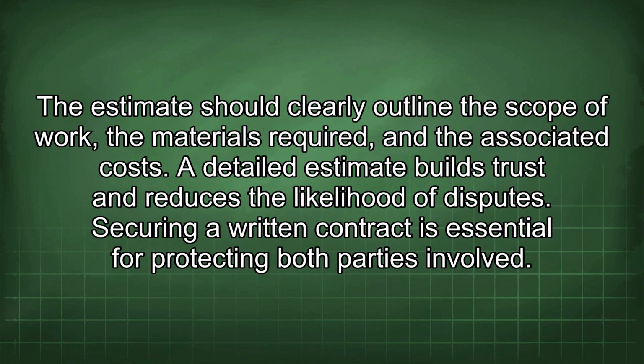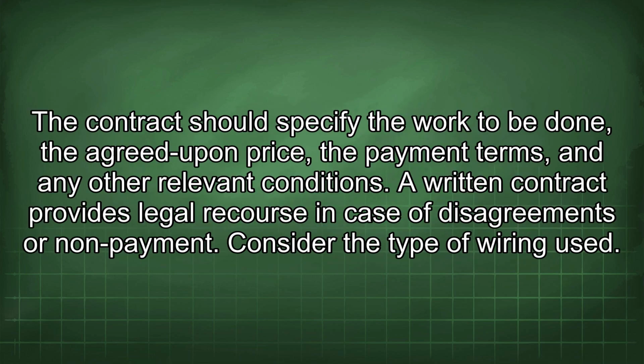The estimate should clearly outline the scope of work, the materials required, and the associated costs. A detailed estimate builds trust and reduces the likelihood of disputes. Securing a written contract is essential for protecting both parties involved. The contract should specify the work to be done, the agreed upon price, the payment terms, and any other relevant conditions. A written contract provides legal recourse in case of disagreements or non-payment.